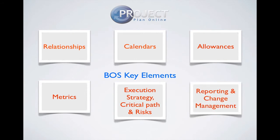Finally, what are the reports you're going to produce? How regularly are you going to produce them? What's their distribution? And when a change happens to the schedule or is required — such as a rebaseline — what's the process that you will follow? Make sure that people follow that process and don't go off making random changes that you can't control.